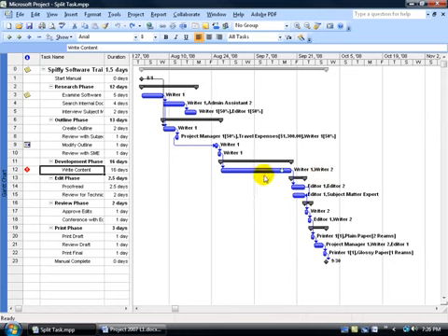So what if I go ahead and divide this into 2 tasks? Writer 1 of course works on the first 5 lessons, and then Writer 2, the second task, works on his. Now think about this for a second. Does Writer 1 need to finish or complete his first 5 lessons before Writer 2 can start his last 5, or lessons 6 through 10? Well, maybe. I mean, if there's something that's connecting them all, but if not, then I can go ahead and have them both start their task at the same time.